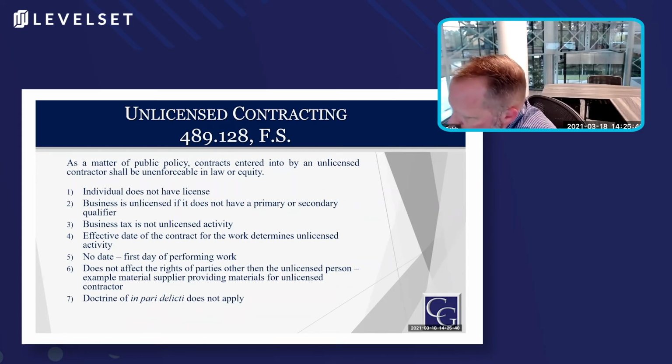And so what that means is if a homeowner or a customer approaches you and they know that you are not licensed, but they go through with the work anyway, and then they don't pay you, you cannot, as a defense to that, argue one, that your contract is enforceable, because you don't have the license. But number two, you can't go after the homeowner and say, they knew I was unlicensed and they hired me anyway. When you balance those harms, the harm of the unlicensed activity is the greater harm than a homeowner taking advantage of that scenario. And so yeah, the "well, he knew I was unlicensed" defense does not fly. And it has zero application in unlicensed activity cases.